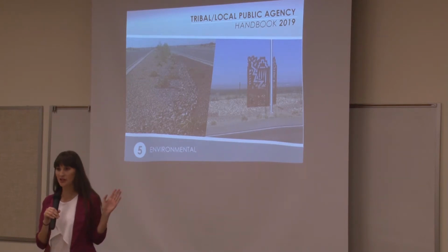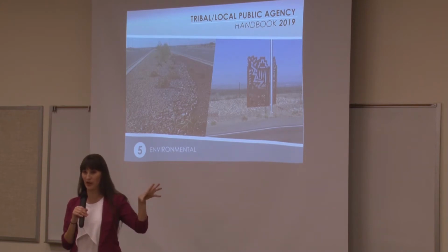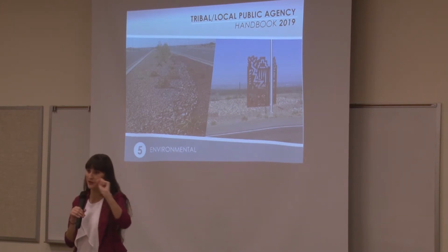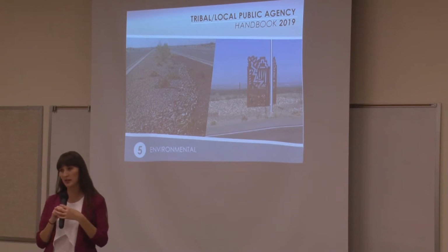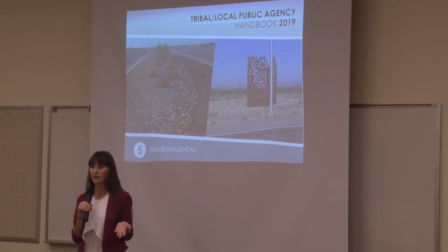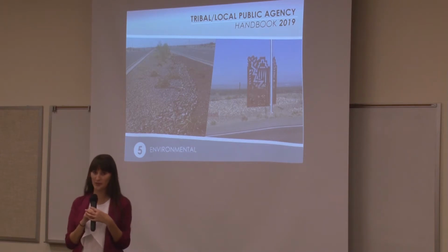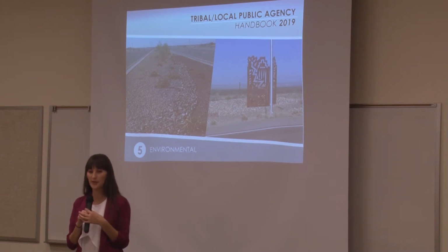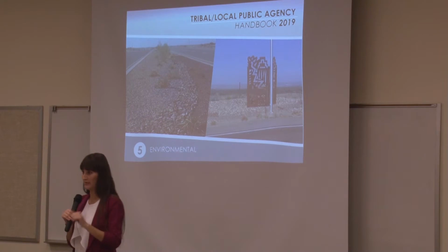So Jessica mentioned in project development that there are 5 required certifications for every project. Environmental is the first of those. And the reason that we put environmental first is because often it can take a long time to get an environmental cert, depending on the scope of your project. We also recommend that you start it first because you will need an environmental cert before you can obtain a right-of-way certification. Okay, so start your environmental as early as possible.